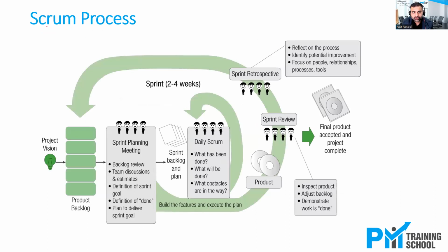Now, what I did is I chose one method that is very, very lightweight, simple, and has been in the market for a long time. This is an agile method called Scrum. Normally Scrum is for smaller teams. We call it plus minus 7, meaning a team of 5 to 9 people. Again, there is no hard and fast rule of having 5 to 9 people, but the point is it is very effective for small teams.